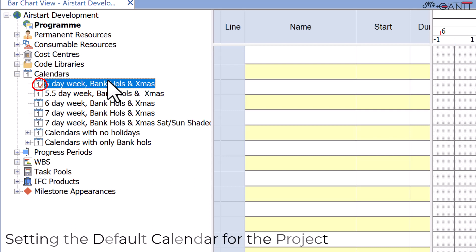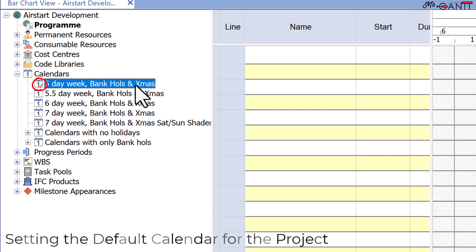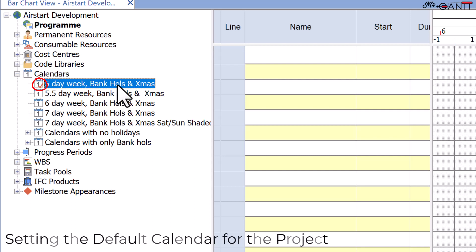Any task you add to the project will follow the work pattern of the default calendar. If a project contains several calendars, you can define which one is the default calendar by right-clicking the calendar in the project view and choosing task default.